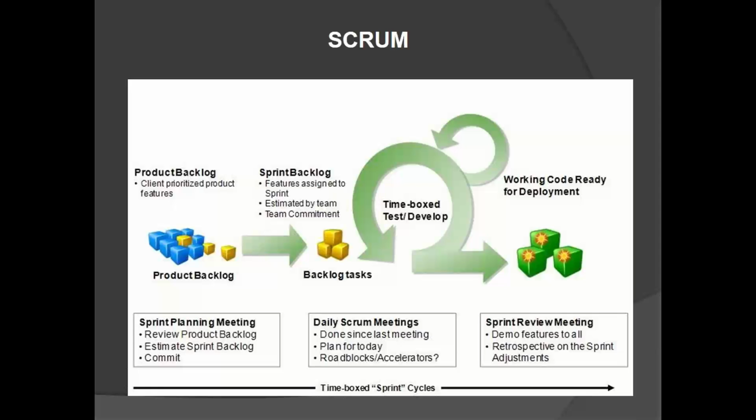Okay. Then next one is sprint meetings. Sprint meetings we are going to conduct whenever we start a sprint. And in the sprint meeting, we are going to discuss what we need to complete within that particular sprint. What is a sprint? A sprint is a time box of 30 days which contains events like sprint planning, sprint review, sprint retrospective, and so on. Each sprint will start after the completion of the previous sprint, and a sprint enables predictability. It limits the risk, and the sprint time is constant throughout the project, and a sprint ends when the time box ends.